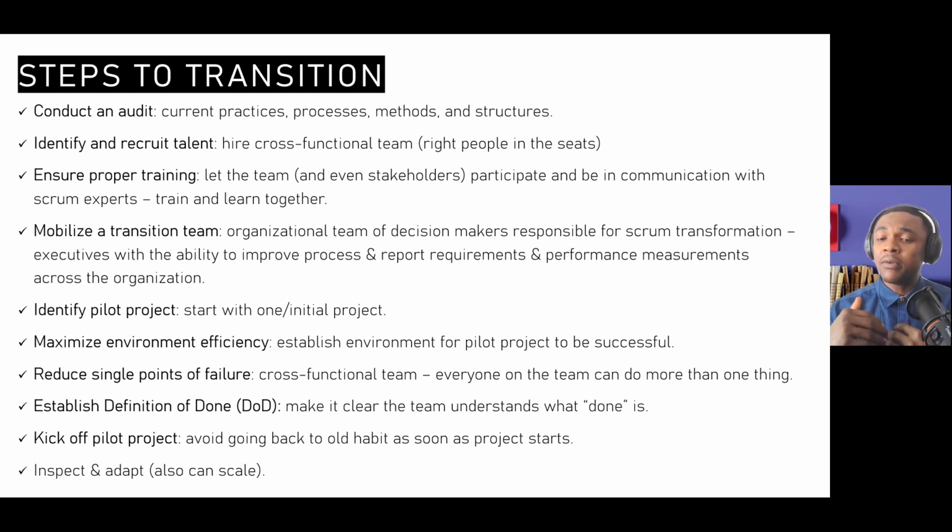With that, another step you'll take is to make sure that the team understands what it means to have a definition of done. It's really so funny when you ask a developer, for example, Mr. Philip, are you done with XYZ ticket? And he will say, yes, I am done. Right? And then you go further to ask, have you tried to fix XYZ? He says, well, I haven't fixed XYZ. I'm about to. So I am almost. Sometimes team members need to understand what done is. Done means that every I has been dotted and every T has been crossed. Done means that what the team has agreed to do in order to consider that story to be done has all been checkmarked. So team members need to understand that, so that would help them in their practicing of Scrum.